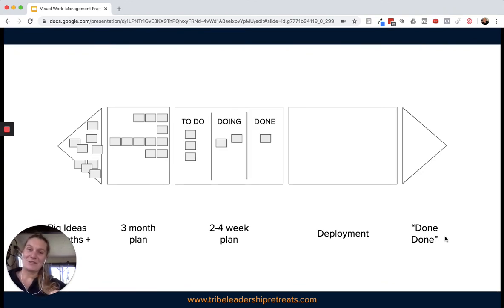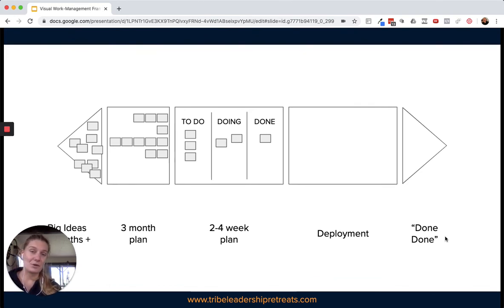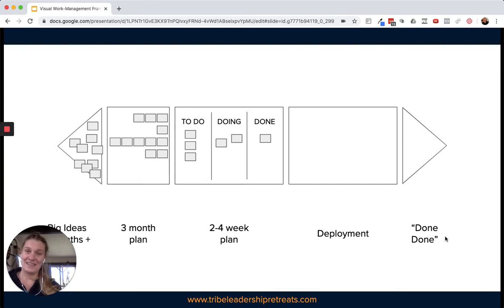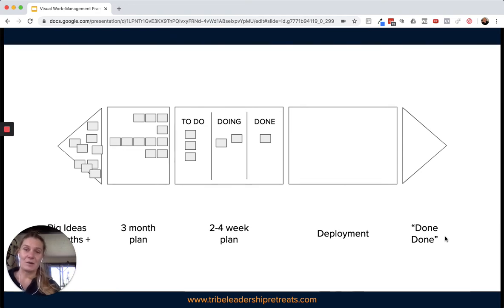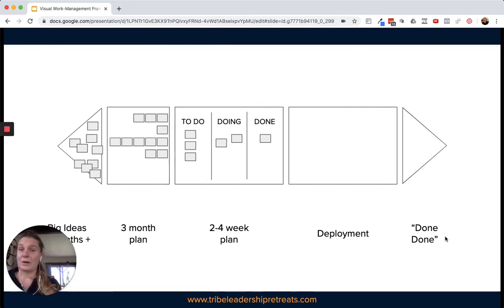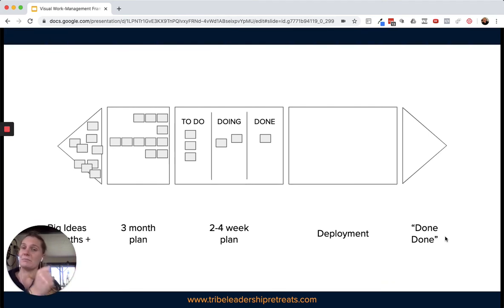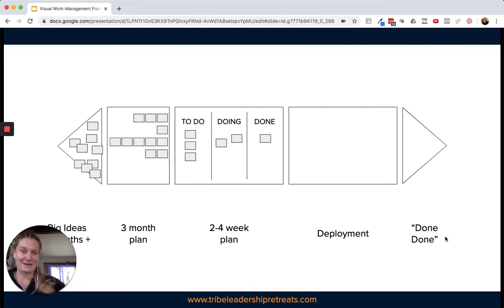Keep moving across to the right and you hit the two- to four-week plan. This was a really simple Kanban board where the team spent most of their time. We divided this area up into three columns: to do, doing, done. Every two weeks, the team would start their two-week chunk of work. They'd have a conversation about what they aimed to achieve in that two-week period. We would pull the work in from the three-month plan into that to-do column, and then they'd go away and run with it for two weeks. At the end of that period, we'd review what was done, make some decisions about what to do next, and the whole process would start all over again.